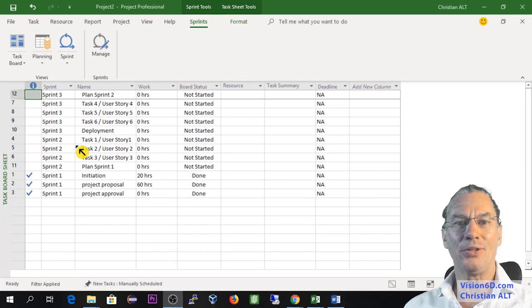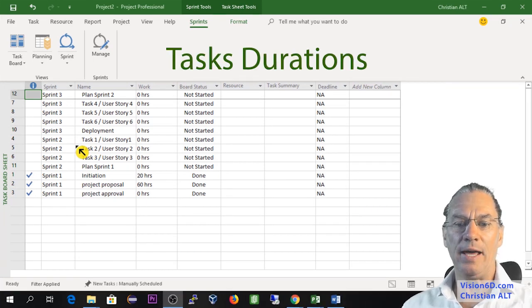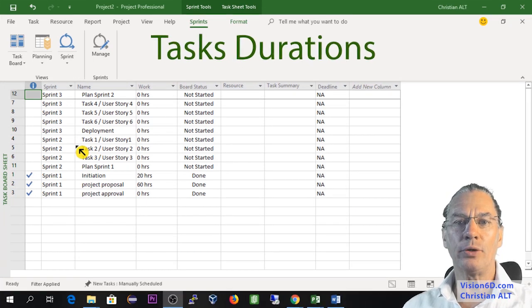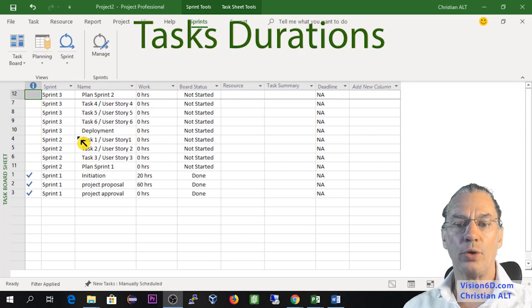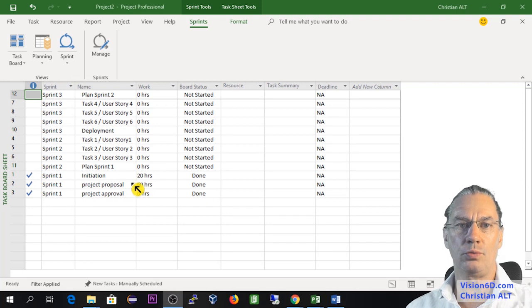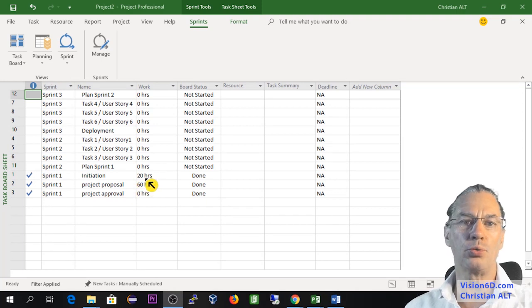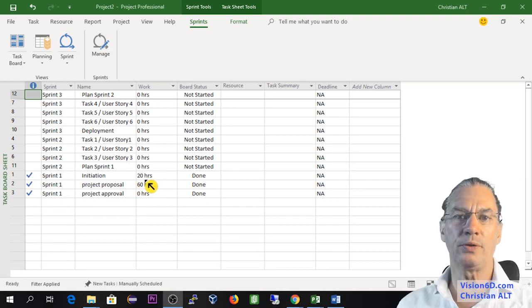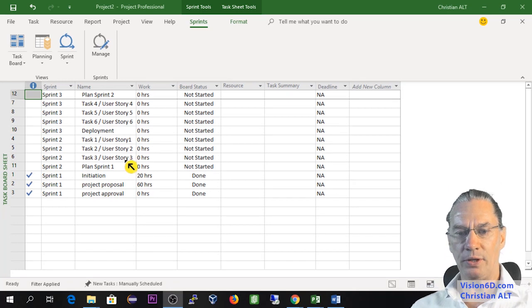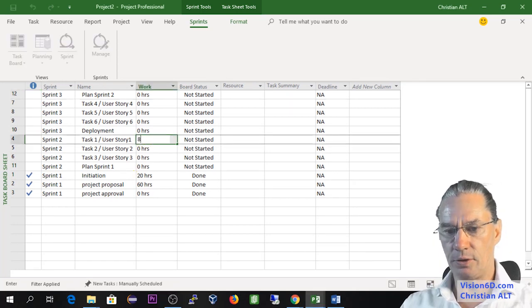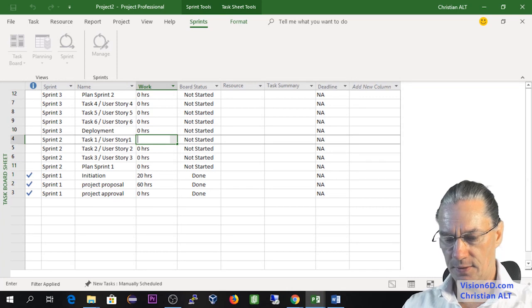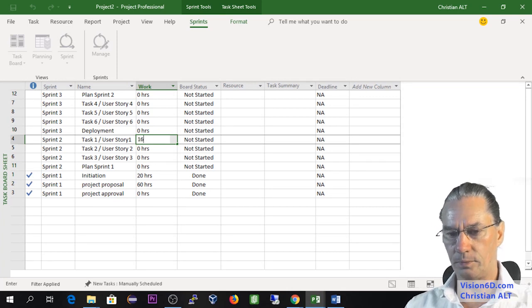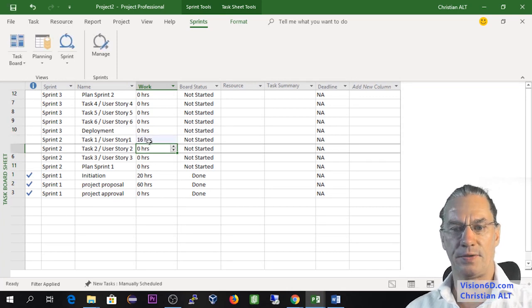So now I'm in the task board sheet. And now I'm going to look with you for some durations of the tasks. You see here initiation project proposal had taken about two weeks. So it's about 80 hours. So I'm going here to say that the first task is going to be done in 16 hours.